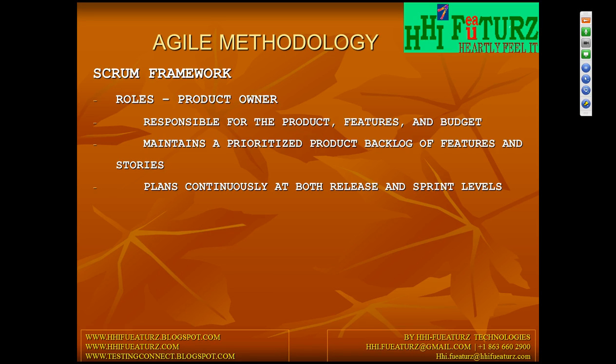So two user stories got pending, then you have to carry them forward to the next sprint. For the next sprint, how you plan is: you already have two user stories, then you consider the bandwidth you have for that sprint. Along with these two user stories, you pick up one or two more and go for development.